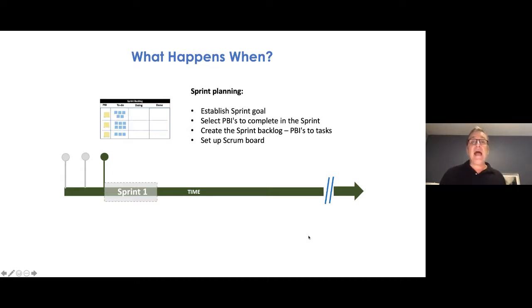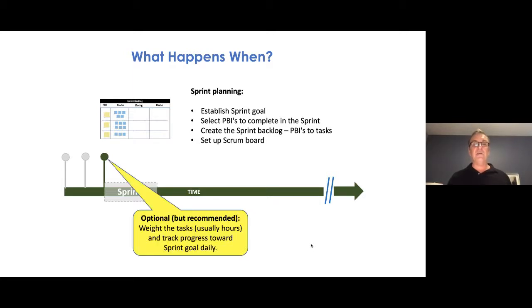All right, after we have our initial backlog and we get started, then the team does sprint planning. This is where they build their to-do, doing, done board, their Scrum board, which is a borrowed practice from Kanban, for example. PBIs are selected and brought into the sprint, and those little blue tasks there represent the tasks in the to-do column.